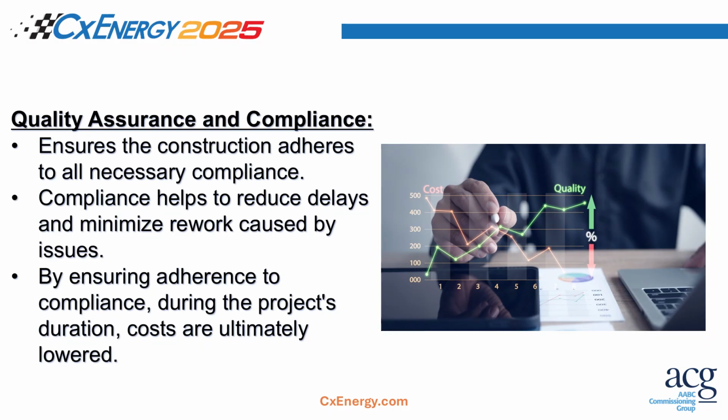And then ensuring quality performance or quality assurance and compliance. It's proper installation of sensors. There's a lot of times where I'm trying to work with the controls contractor early in the project and say, we got a couple typical units. Let's install the sensors on this one unit first. We'll look at it together. We'll determine if the sensors are correct, if they're not. And then if they are, then we can copy and paste and go through all the sensors so we're not writing up 30 air handlers of the same issue.